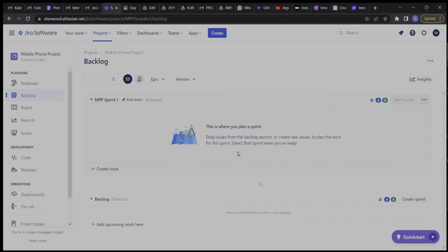So now those are user stories under that feature, connection, right? Connection was a feature and then it was broken down. Connection is too big. What does the customer want to see under connection? The customer would probably say, I want an option where I can have Wi-Fi, Bluetooth to share, data usage, mobile hotspot, and tethering. Those were the requirements the customer brought, or the discussion. So now the team is breaking it down to start working on it. Let's say Wi-Fi is one of our user stories under the feature, or the epic, connection.